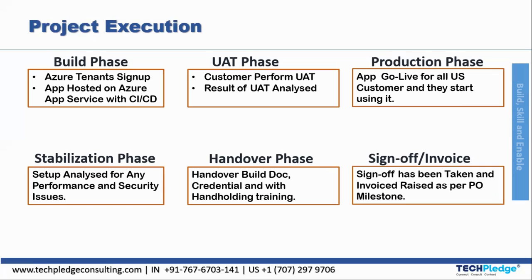After handover comes the last step: Sign-off and Invoice. The sign-off is taken and the invoice is raised as per the purchase order milestone. All phases from build, UAT, production, stabilization, handover, to sign-off and invoice come under project execution. This concludes the overview from project envisioning through project execution. We'll take a break here and meet for the second module.